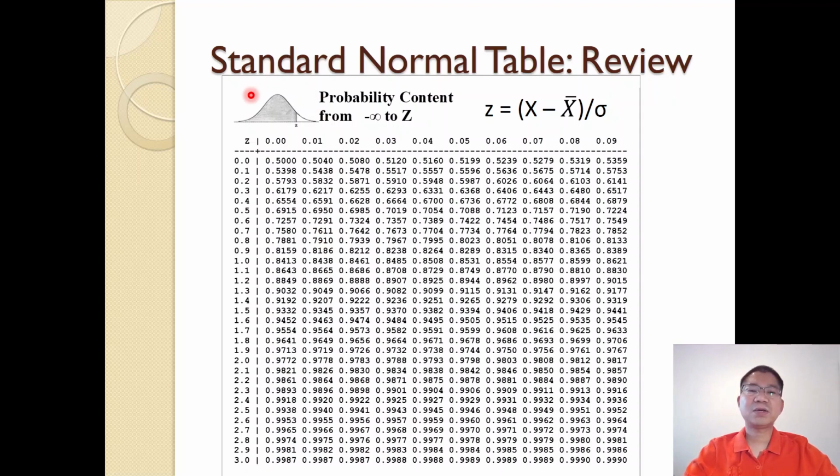And in the statistical methods class that you took, we can determine the Z-score. The Z-score at any point X in here is already standardized. So we standardize with the Z-score: X minus X bar, which is the mean, divided by the standard deviation. And then we can find the probability associated with the Z-score.